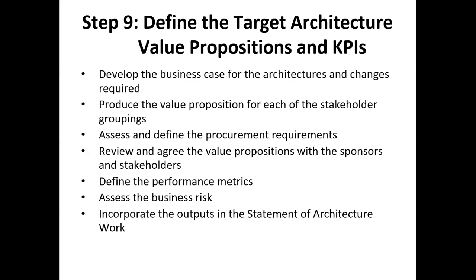Probably escalate. You penalize them. Because, for example, consider any IT organization: if the SLA is not maintained, 30% of the money is gone. Or 20%, whatever. That is how they do it. Because you agreed to a certain level. If you went below that, we are going to penalize you because you didn't give me what I agreed with you. That is called SLA, service level agreement.